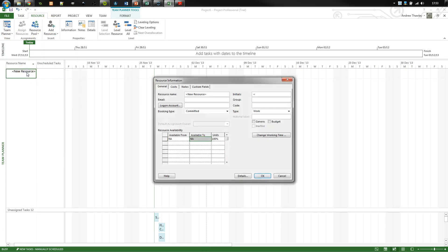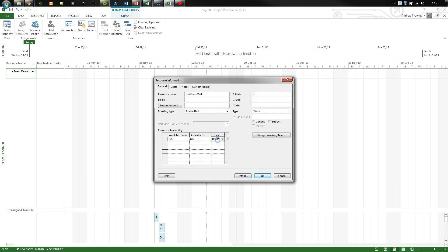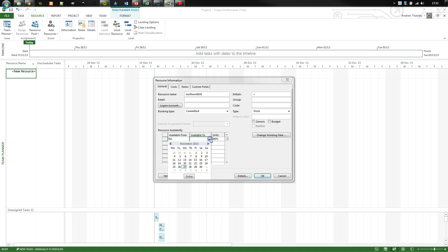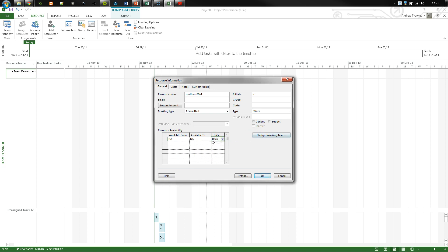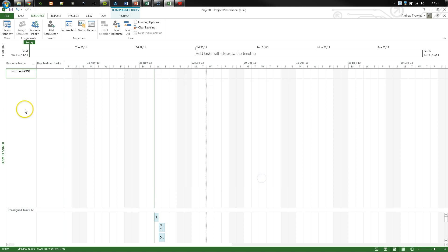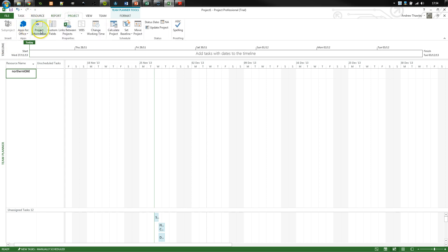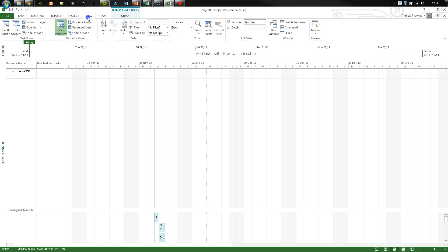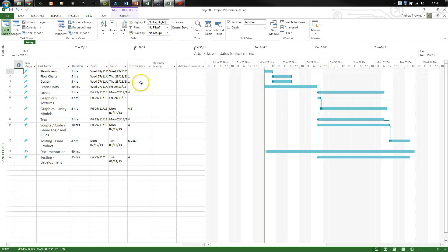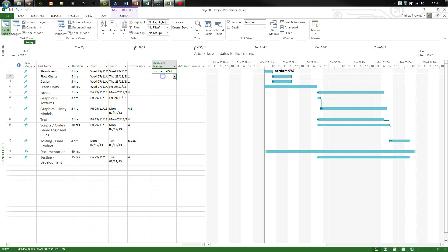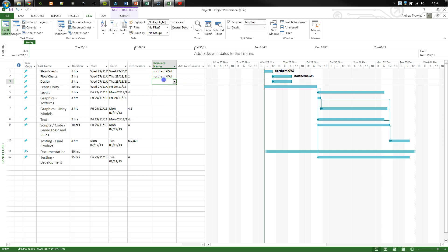So I'm going to add one in. I could add computers, people. So I'm going to add myself. I want to set time to the persons available, all they can do or how much work they're actually able to do. We can edit those details. So I've got myself in there. I think it's project, I want to go and view, where's my Gantt chart. There we go. Now under the resources, I can allocate the resources. Now because these ones are dependent on it, it's automatically been fine. But when I do this next one...